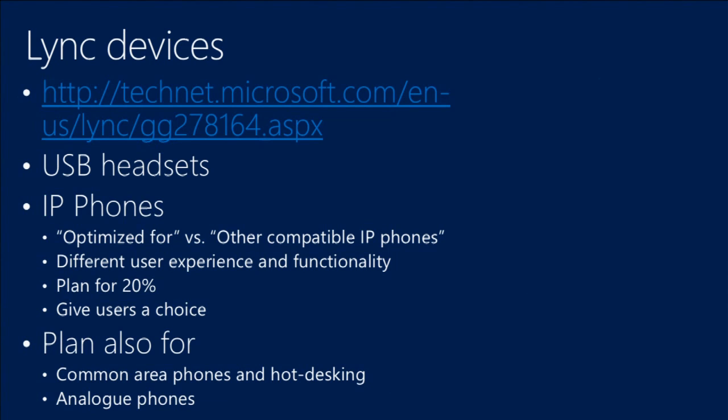Usually we say to plan for about 20% of users requiring to have an IP phone, but this is very, very different from vertical to vertical, from country to country. It depends on the users. If you give users a choice, you have the best chance that they will be successful.